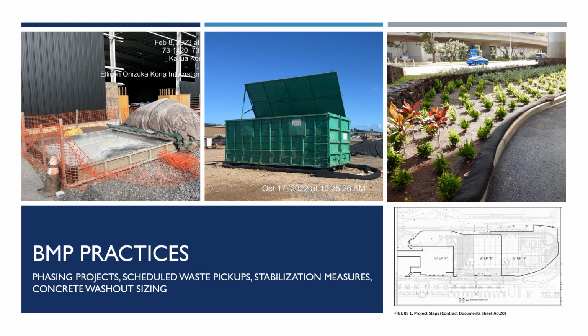Implementing final stabilization measures sooner could allow projects to remove sections of BMPs and eliminate the need for BMP maintenance of those areas. Implementing robust and adequately sized concrete washout facilities could decrease the likelihood of overflow and associated cleanup efforts.